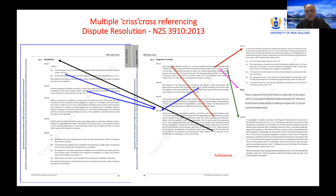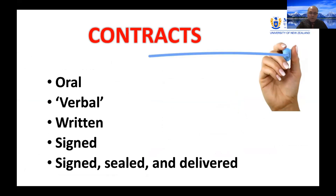The plain language contract I'll use over the next few days has zero multiple cross-referencing — only references to appendices. Before we look at contract terms in detail, a word of warning: contracts don't have to be in writing, don't have to be signed, sealed, and delivered. Generally, contracts don't have to be written, signed, or executed as a deed. Many contracts every day around the world are entered into orally.